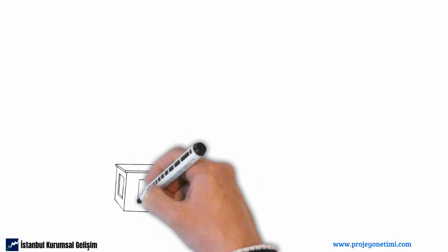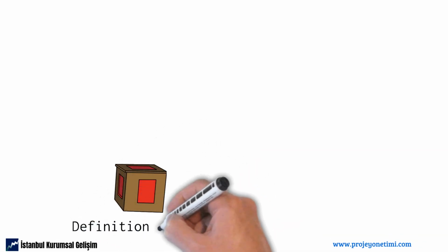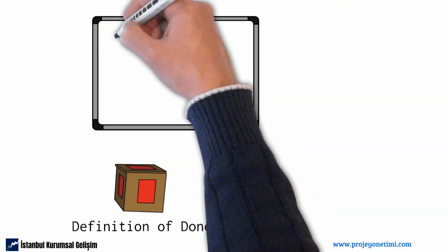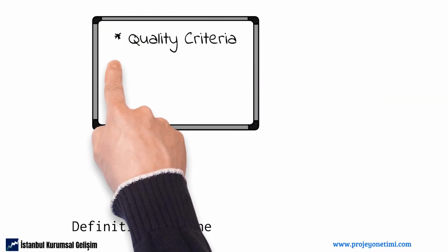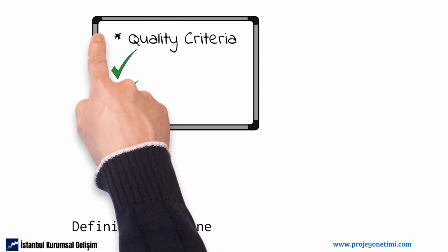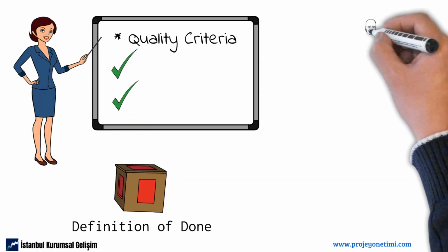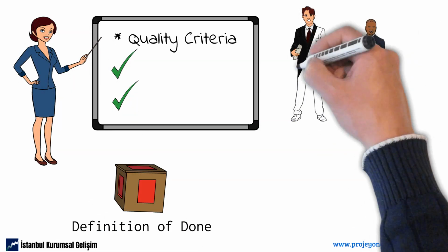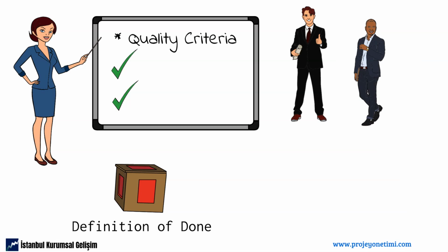The most important feature of product increment offered to stakeholders is that they comply with the definition of done. Only the features that meet the conditions in terms of quality criteria are shown to the stakeholders. This is because an increment that does not meet the quality criteria is not considered complete because it is not yet ready for use by the end customer.